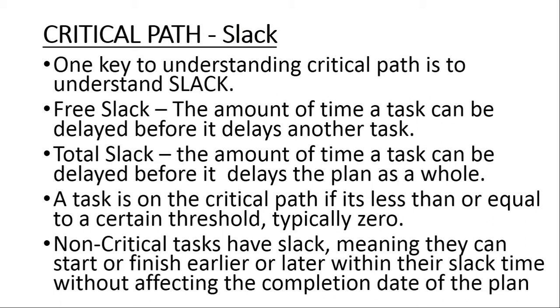The fact that it's delaying the next task doesn't necessarily mean it has delayed the whole project, because the next task itself might also have a lot of slack, meaning it can be delayed without affecting the project. But when we talk of total slack, we are talking about the total amount of time that a task can be delayed before it delays the plan as a whole.